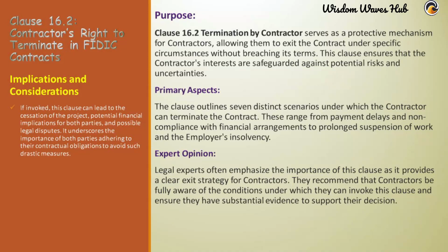Example: in the U.S., if a building project is halted due to environmental concerns and the necessary environmental impact assessments, as mandated by the National Environmental Policy Act, NEPA, are not completed within the stipulated time, a contractor might invoke this clause. If the employer becomes bankrupt, insolvent, or faces similar financial difficulties, the contractor can immediately terminate the contract. This protects the contractor from potential financial losses.